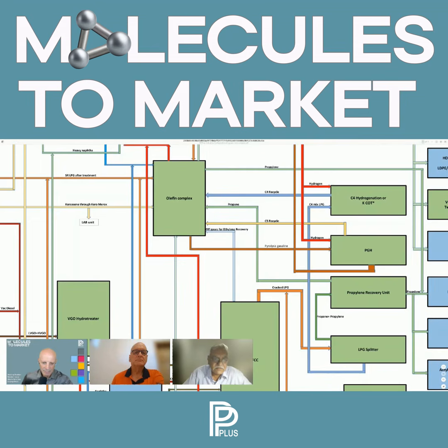Second thing is, now we have structured a plot plan, and there is a process as to how it is made and approved, because everybody has to be a party to that. Once I freeze this document till the end of the project, I'm not going to change it. So this is a very vital document. And in India, this document goes to various kinds of mandatory and statutory approvals.